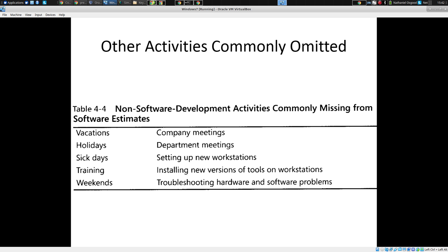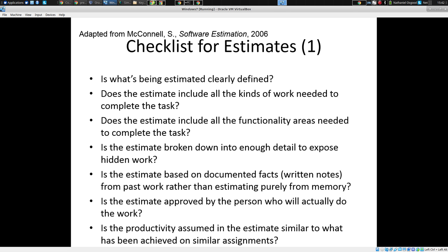Yeah, Mason. Exactly. But to do that granularity of estimation, you're kind of designing the thing a priori. That's right. You're thinking through the steps, and you're thinking in concrete terms, what do I need to put this together? Hopefully you can reuse some elements of those plans to plan out the tasks, right? And those turn into mini milestones, which Will could put into Trello. It's something to accomplish. But you're absolutely right.